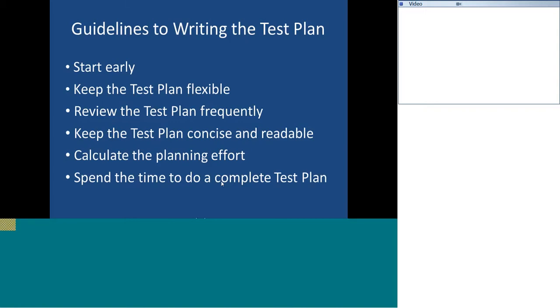So this planning effort will depend on the changes that will be coming towards your testing team. It can be requirement change, or it can be your resource level changes. There can be instances that some of the resources may leave the project and they may join some other project during your test execution and all. So at that time, your test plan should be changed. It should be flexible to accept any new skill set or to remove any skill set from the team and all. So all these things will be tracked as part of test plan.